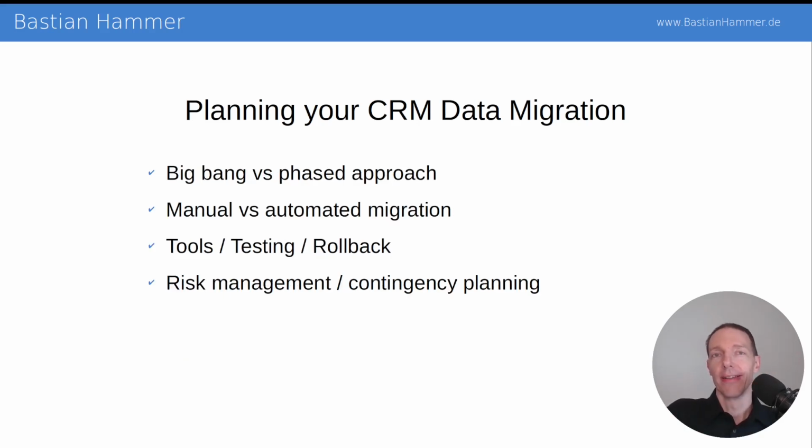Now, going to the how you would actually deploy or roll out your migration. So there could be that you prepare everything, you test it thoroughly, and then you just say like on a Sunday night, you would completely switch over to the new CRM system and everything is new from Monday morning on. Or you do a phased approach if possible.